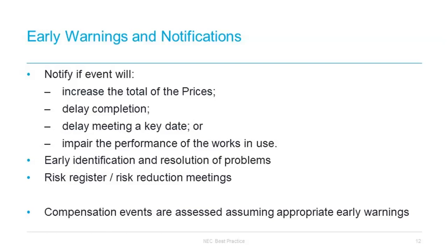If the risks do not come to pass and none of the money has been spent, there is a bit of a gain share for the contractor, but it also allows for it to have been priced and managed. Whereas on a straight activity schedule, a lot of the time that is written out, because otherwise it would sit with the contractor, as it would give the contractor a pot of money that they can then spend, and most employers will be happy that these risks have been identified.